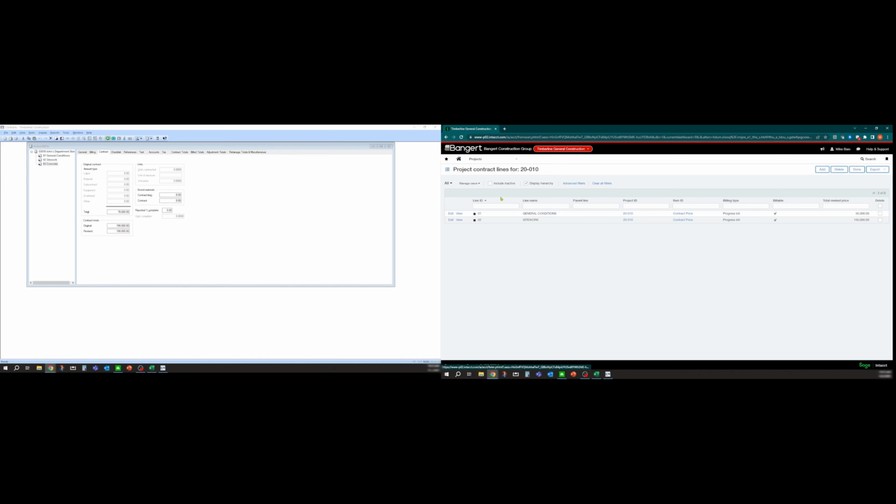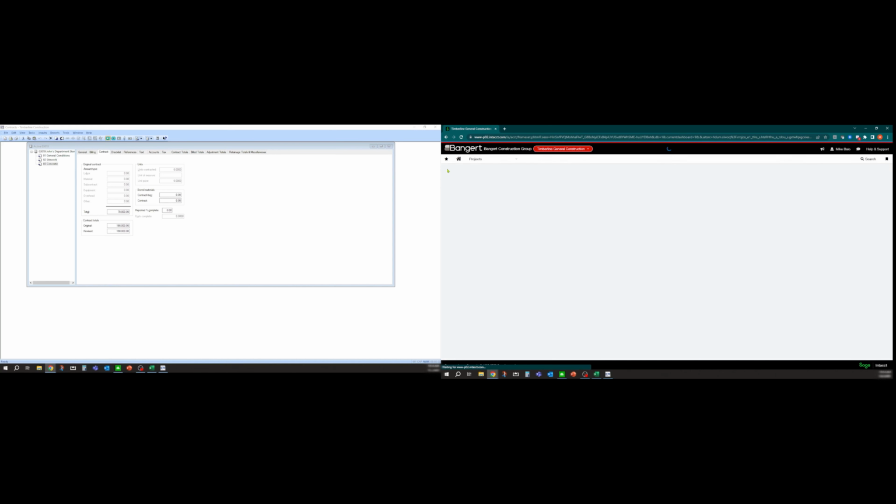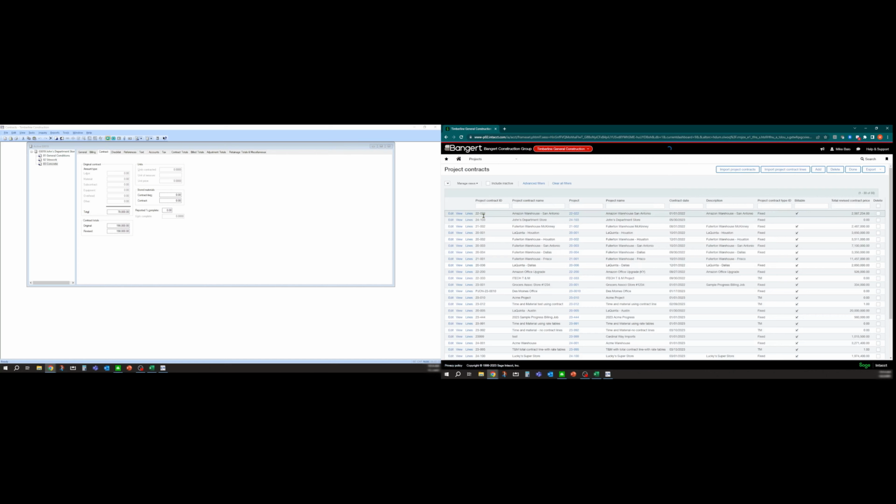Intacct. What we're hoping to get you to is something that a lot of people have asked for and wanted in 300, which is the ability to import in your schedule values line items. So instead of doing that, I can come into John's here under project contracts, and you'll notice on top, I can import in project contracts. That's the header. Usually I just say set that up. It's pretty easy to set up. And then I can also import in the project contract lines.